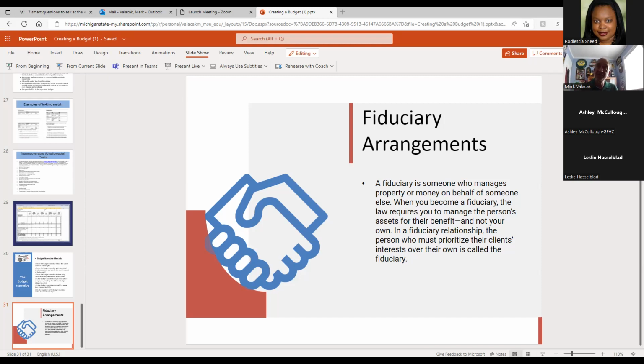So you want to work with your funding agency to adjust your timeline, or to adjust your budget, or maybe to allow you to use a temporary nurse, and switch contract lines. Typically, they'll allow you some leeway in moving dollars. Like the state of Michigan, for example, we could move up to $5,000 between lines if we justified the cost and got it approved by the person who was overseeing our grant.